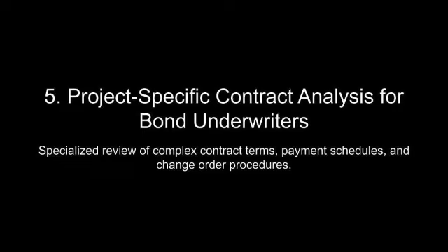Another red flag is the misalignment of payment milestones with project cash flow needs. For instance, a schedule that heavily backloads payments might create liquidity challenges during early project phases, forcing contractors to rely on external financing or personal reserves. This not only increases the contractor's financial burden, but also raises the probability of defaults, particularly in industries with slim profit margins. Sureties must also scrutinize the timing and sequencing of milestone payments.